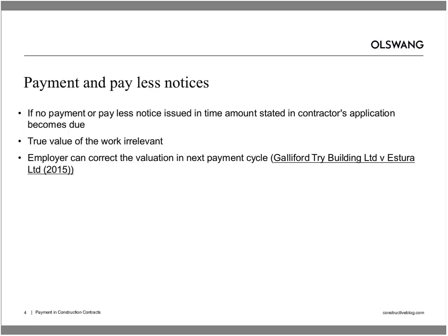That's very helpful. Now, we've been asked what a paying party can do if the supplier deliberately overstates its account. Is this something that a paying party can protect itself against? Yes, I think the obvious answer to that is that the employer can serve the relevant notices, and I think that a court is unlikely to have very much sympathy for an employer that is faced with an overinflated payment application but hasn't served the correct notices. The notice regime is how it protects itself.